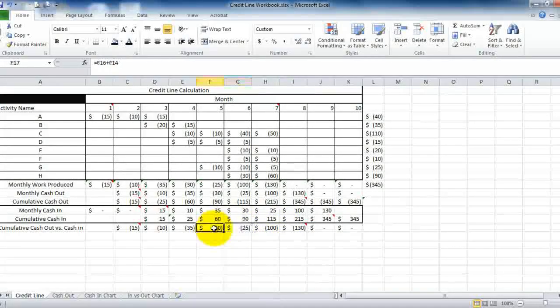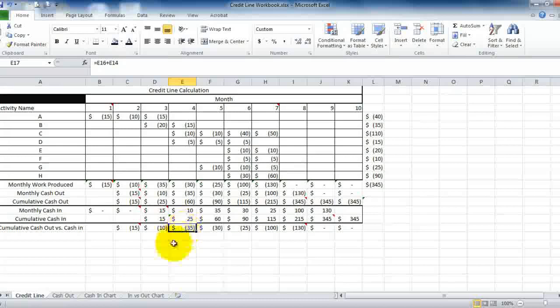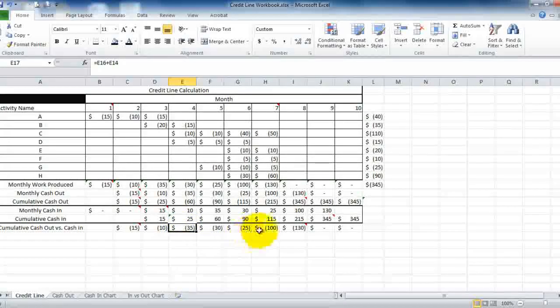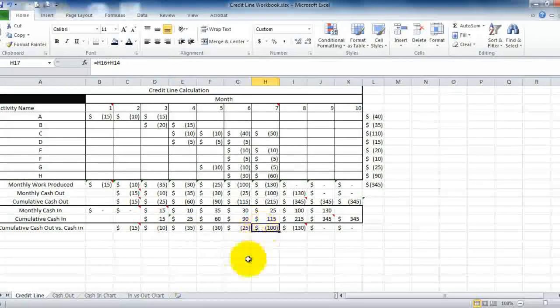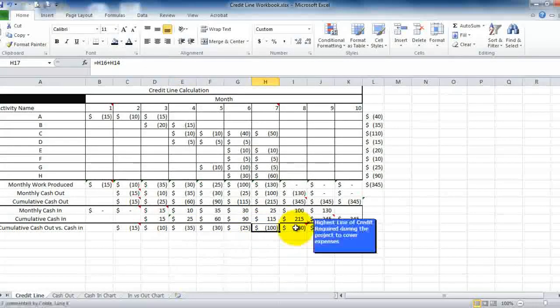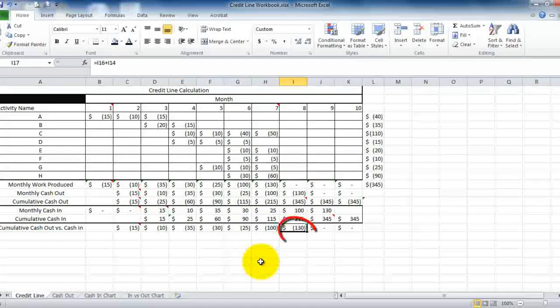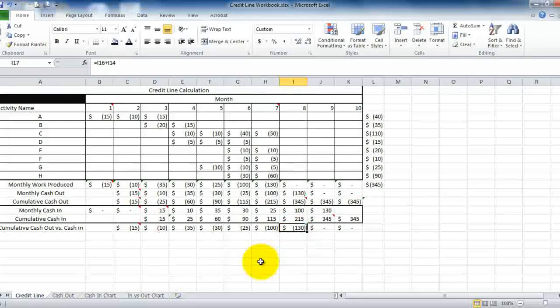Here you're only going to need $25,000; here $30,000; here $35,000 — edging up to $100,000. This highest number of $130,000 is the most important element you're going to have to tell the banker: at this point is your highest line of credit required.